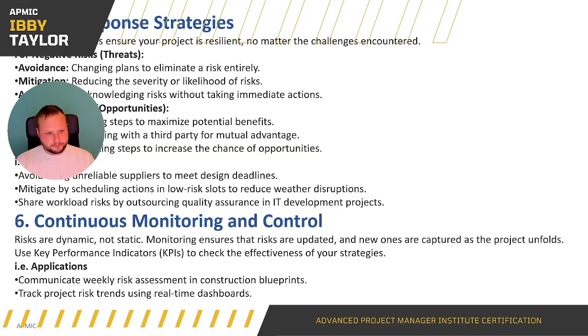Share workload risks by outsourcing QA in IT development projects. Very good. That also works with any other project. Can you look to outsource? Can you bring on more resource? Can you reduce the strain on your resource? Or completely outsource something? Because ultimately, if you outsource something, in the truest sense of the word, it becomes their problem.